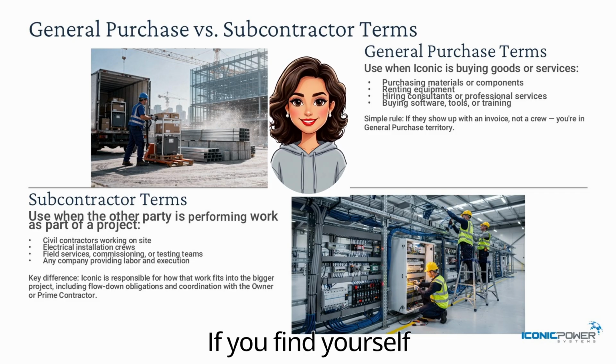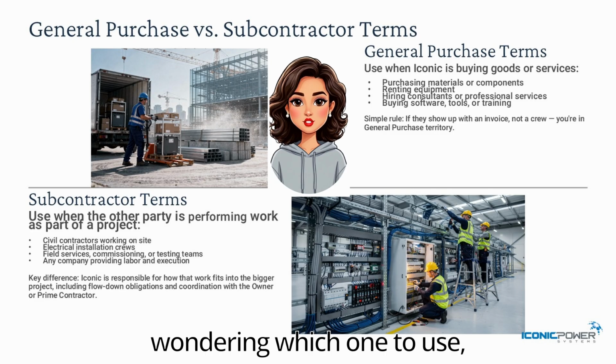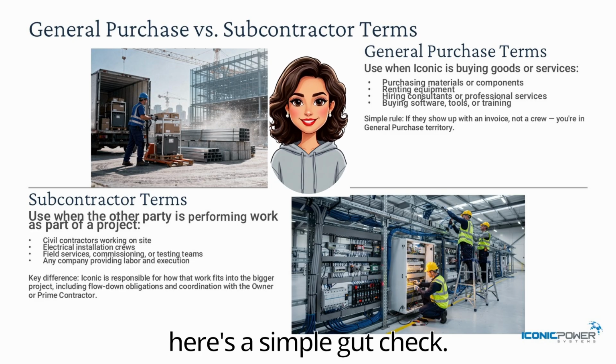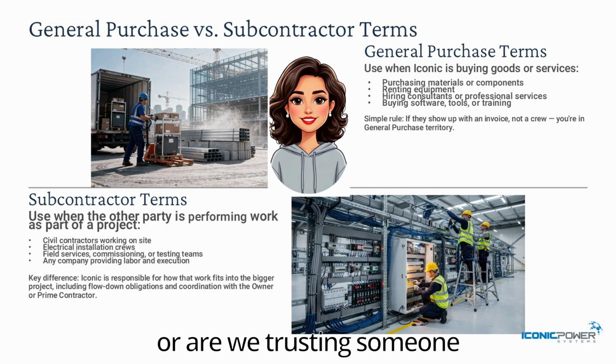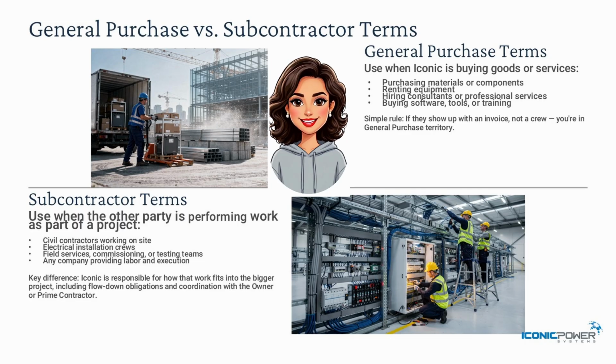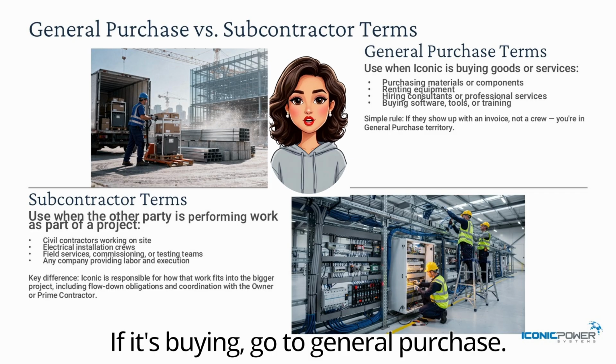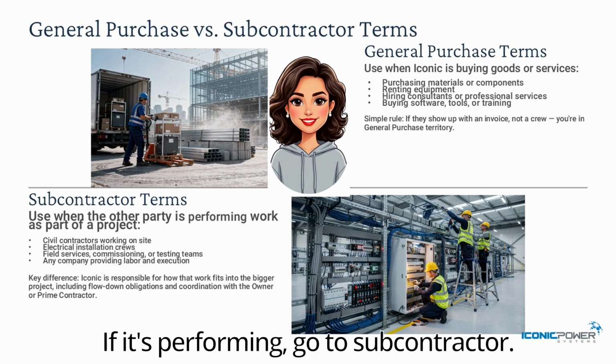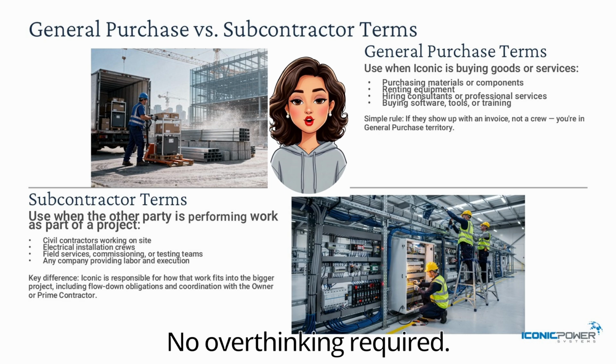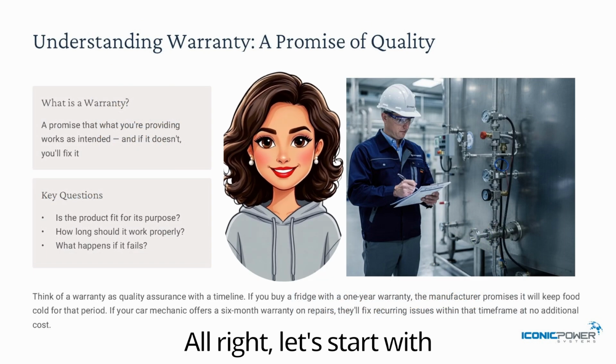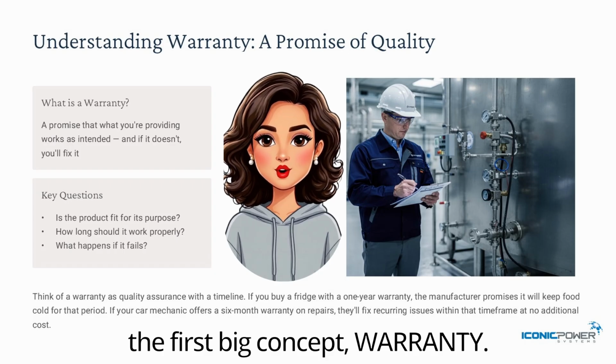If you ever find yourself wondering which one to use, here's a simple gut check. Are we buying something or are we trusting someone to perform part of the work? If it's buying, go to general purchase. If it's performing, go to subcontractor. No overthinking required. All right, let's start with the first big concept, warranty.